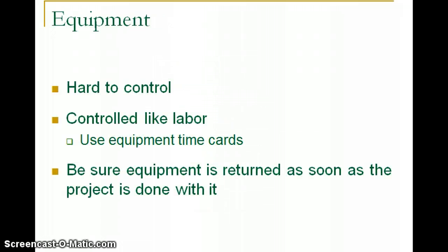In terms of equipment, the equipment is also a cost or an expense to the job. The equipment costs need to be monitored and controlled with the use of time cards. Similar to the labor time cards, the equipment hours are monitored and tracked.